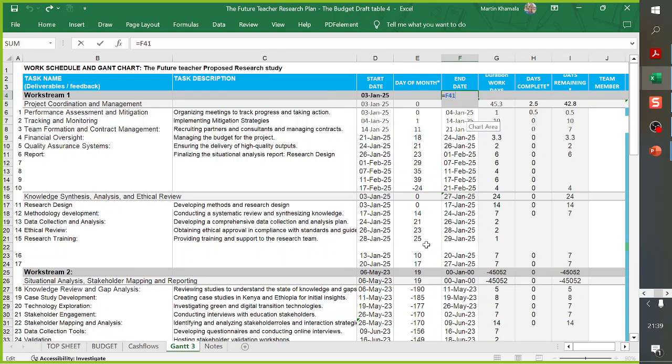So this helps even when Agustina is doing the budgeting, because you budget based on the task. If your institution, for instance Open University, is leading a work package or a work stream, then their budget might be slightly higher than the co-lead, which might be slightly higher than the rest. So the best thing is always to make it generic, so that later, when you're implementing, you have a little bit of room to maneuver.